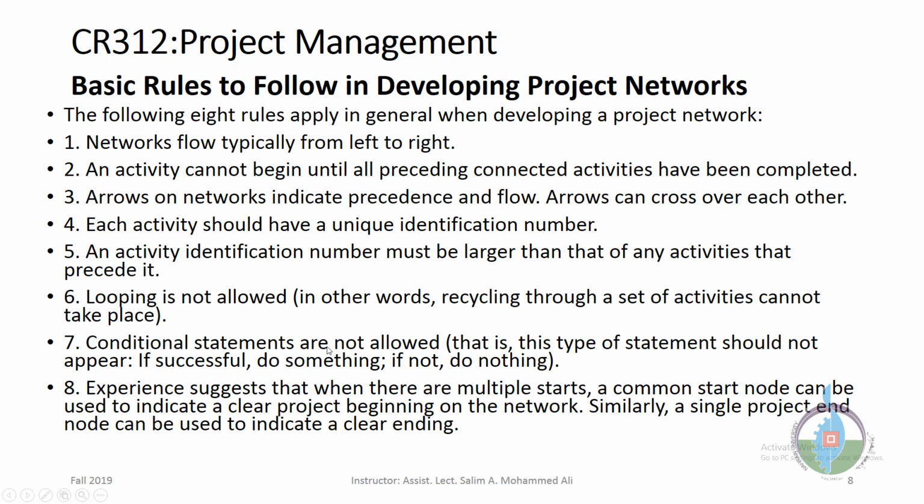Conditional statements are not allowed. This type of statement should not appear: if this node is successful, then do something; if not, do nothing. Conditional is not allowed at all. Experience suggests that when there are multiple starting points, a common starting point can be used to indicate a clear project beginning on the network. Similarly, a single project end node can be used to indicate a clear ending.